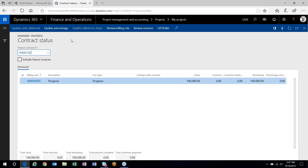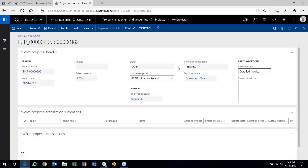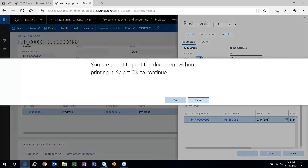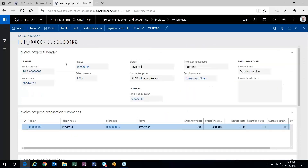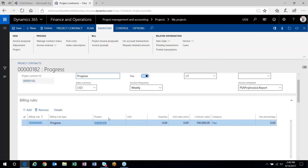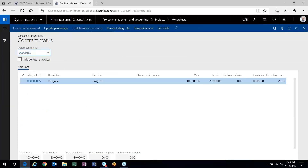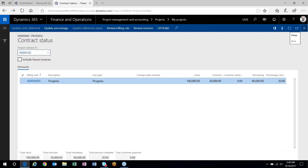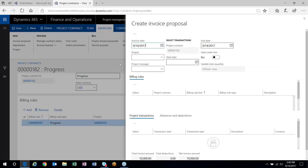I'm invoicing 20% of it, so there will be 80% left to invoice. I'll post it and start the project. The invoice number is generated, confirming it has been invoiced. When I head back to the project contract and look at the Manage Contract Status form again for that progress billing rule, it now tracks the activity: I've invoiced $20,000 against my $100,000 contract value. Then I can continue — for instance, invoicing another 10% on top of that — and create the invoice proposal.